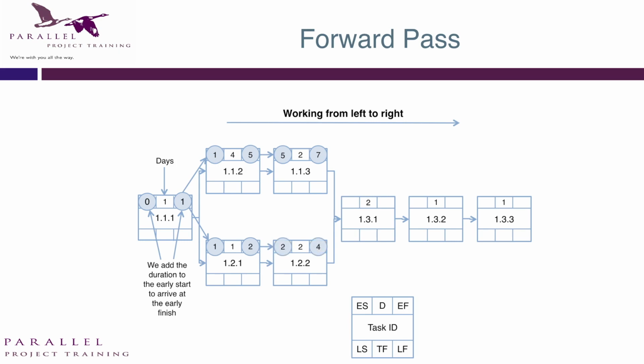So when can that joining task kick off? Well, it can only start week 7. 7 plus 2 gives me 9, 9 plus 1 gives me 10, 10 plus 1 gives me 11. So that's what we worked out some time ago, that the total duration of this project is 11 weeks. And you can see that the longest path is the bottom path.